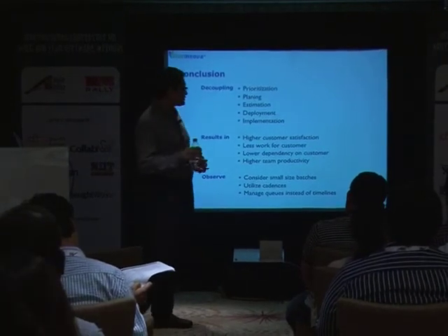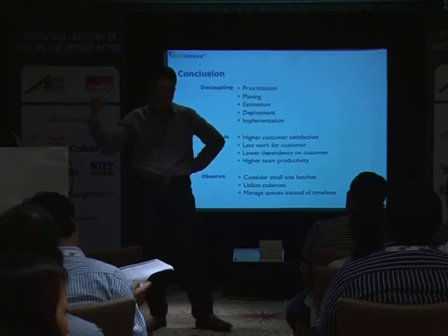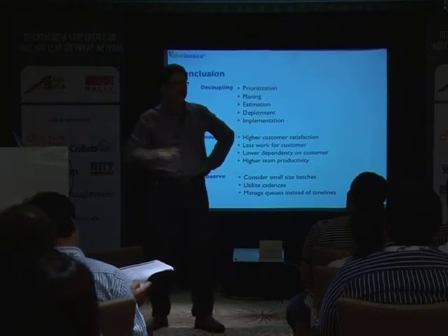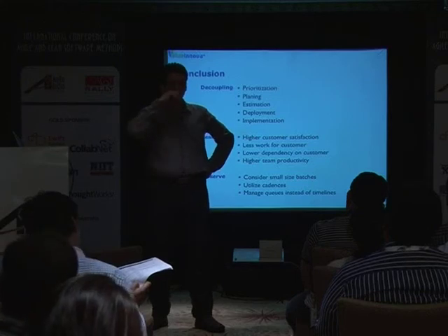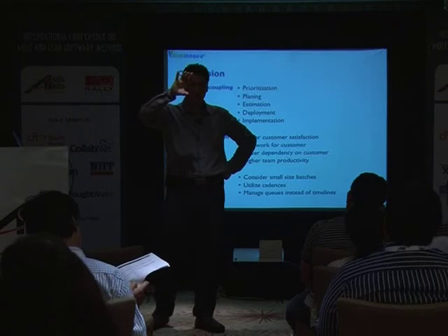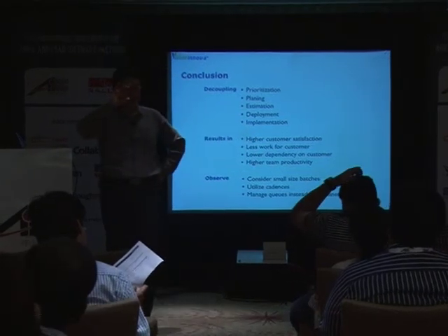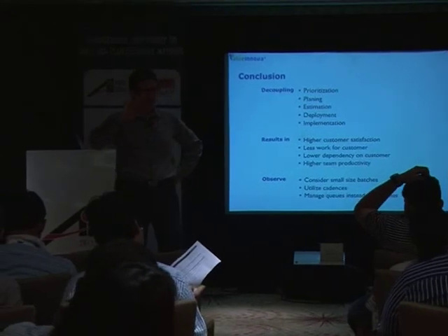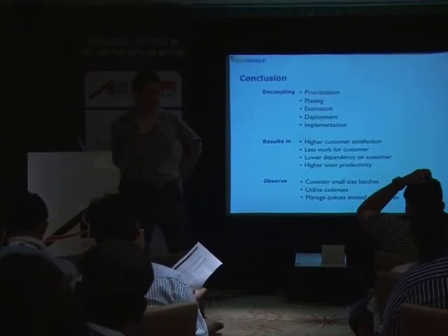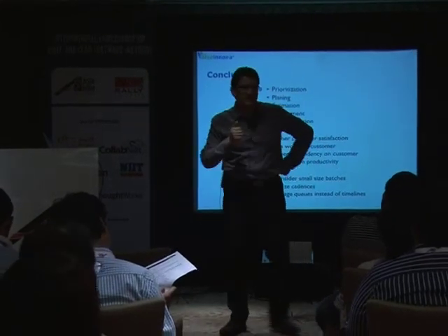And one way to actually appreciate this, that is independent of hard quantification, is the stress level. If you have a large batch size, you will see that your team is going to be stressed. You start lowering it, it starts getting better, but then you keep on lowering it and the stress starts going up again. So you have to be very careful. There's actually an exercise to do that.